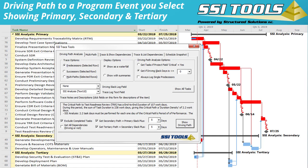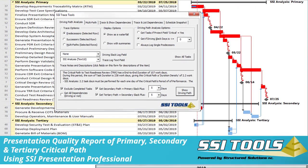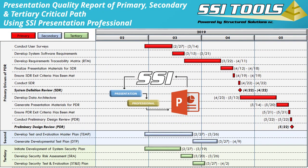Pause the video and give this a try if you like. Open the Advanced Trace Tools form from the Trace Driving Path Task Options and look for the options for secondary and tertiary path towards the bottom of that form. Here's another example of how you might display the primary, secondary, and tertiary as a PowerPoint page using SSI Presentation Professional.